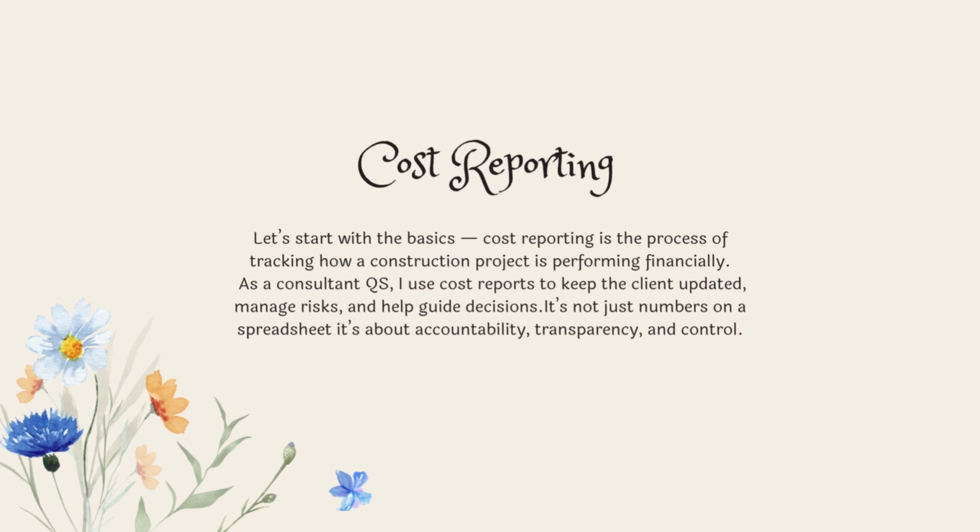So you need to be on top of your projects. Sometimes it gets very administrative and tedious, but every single cent needs to be accounted for. So you need to keep all the delivery notes together. I remember when I was on site, you'd have a delivery note recon, you have the equipment hours, you have daily diaries from what the labor is doing on site, you have CEs or compensation events or variations, depending on what contract you're using. You need to monitor all those changes, any design changes. You need to get those drawings in, remeasure, make sure the costing there makes sense.